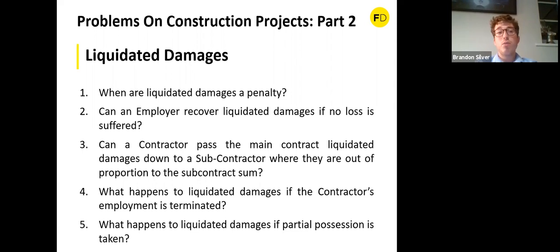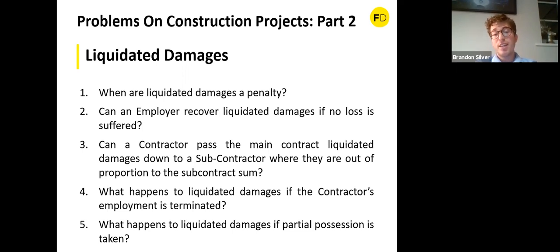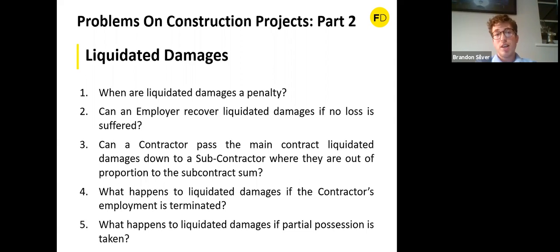The second question: can an employer recover liquidated damages if no loss is suffered? Yes — you do not have to prove your loss; you recover the liquidated damages in the contract provided it is not a penalty clause. Conversely, if the employer has suffered a million pounds of loss but the liquidated damages clause yields a smaller sum, you can only recover the liquidated damages amount, not your actual loss. That is why it is important at the outset to ensure the liquidated damages figure is a genuine pre-estimate of the loss.